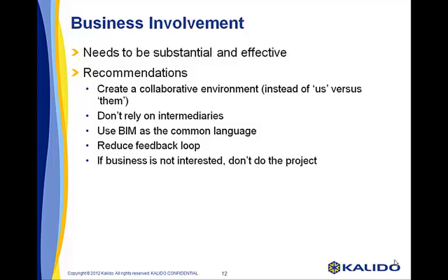Remember that the reason we are building these environments is to have consistent quality and integration. Most integration boils down to a set of business rules which cannot be derived purely from the data. A common response to this request is, "Those people are too busy, we can't trouble them." I guarantee that if you are going to make their lives easier, they will give you the time and knowledge you need. The corollary to this is that if you can't find a business person that is willing to give this time, then you should probably relook at the scope you're planning on tackling.